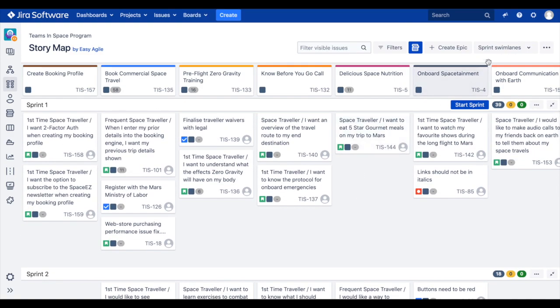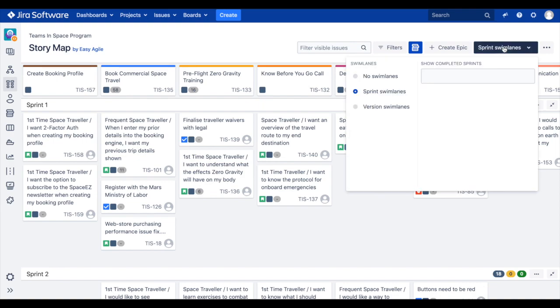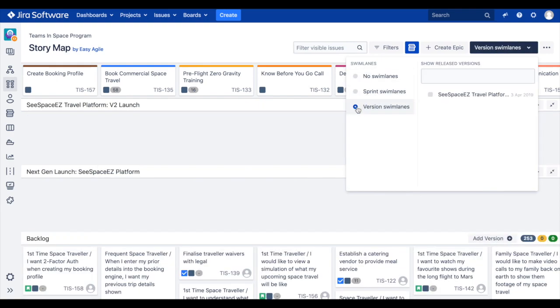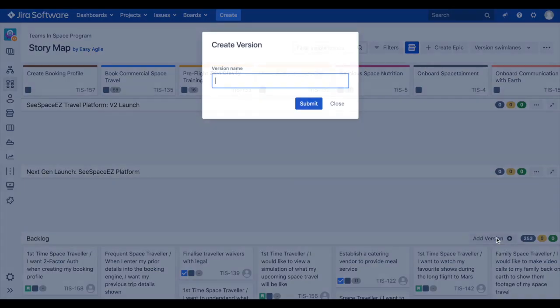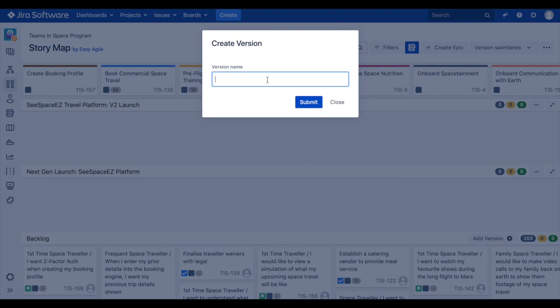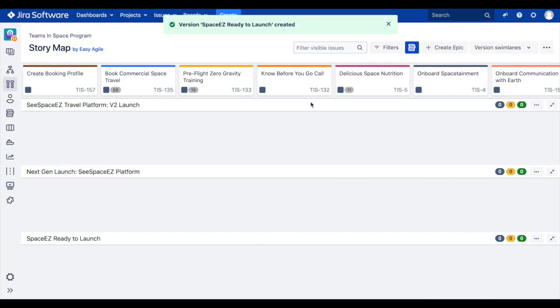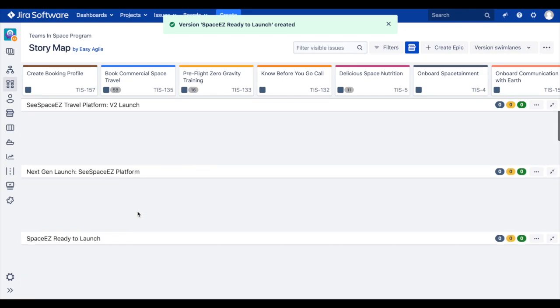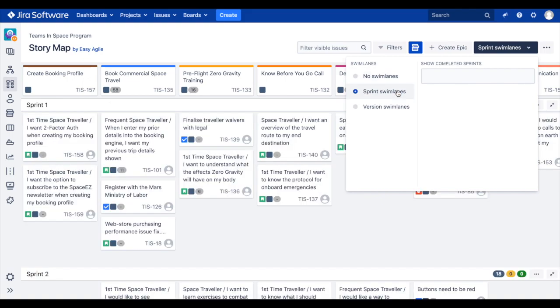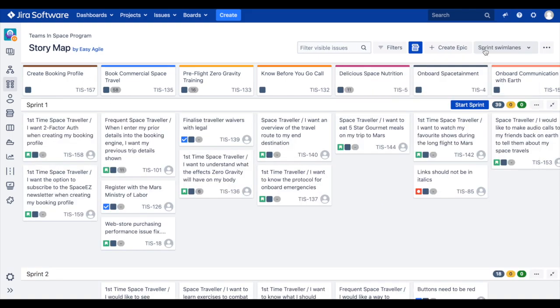To create a new version on the story map, switch to version swim lanes using the swim lanes drop-down. Scroll to the backlog swim lane at the bottom of your story map and click Add Version. Name your version and click Submit. Your new version will appear above the backlog on the user story map and at the bottom of your releases page in JIRA.